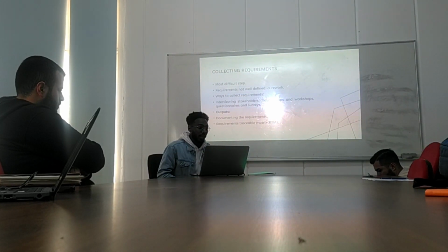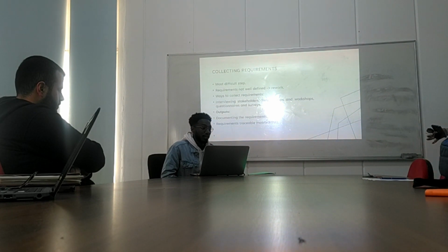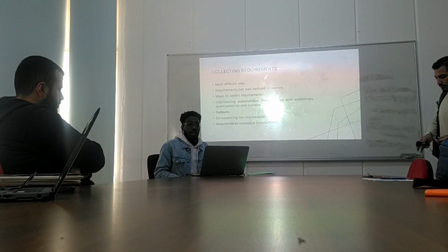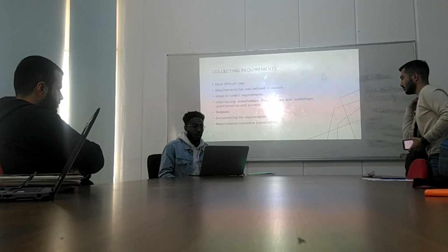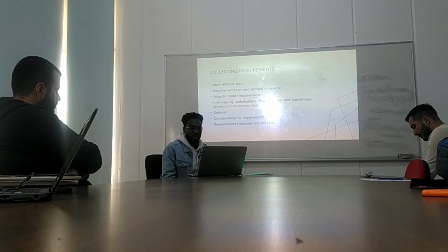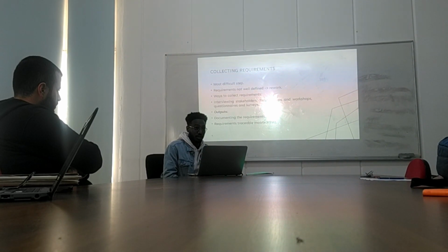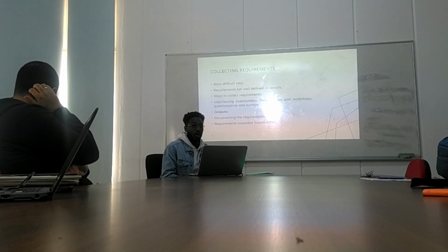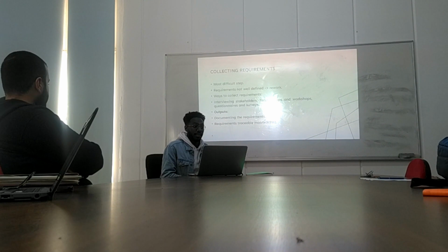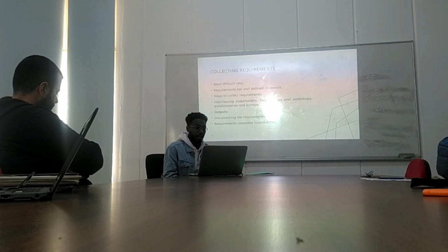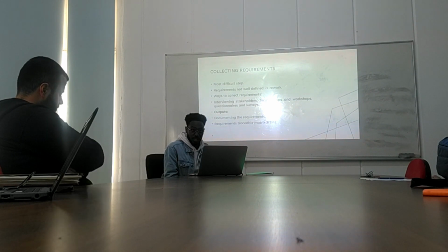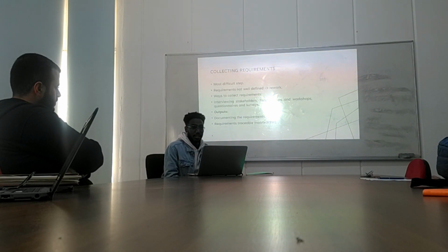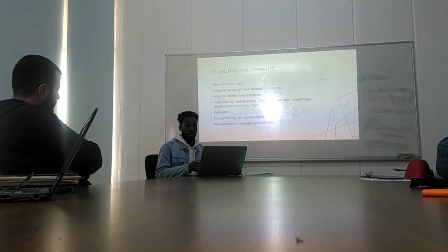And then here we have ways to collect the requirements. We have many ways. The most efficient one, mentioned in the book, is interviewing the stakeholders. We know that the stakeholders can be the sponsors of the project, or they can be the customers or users of the project. But this specific way of collecting requirements is expensive, the first thing, and the second thing, it's time consuming because you are going to interview each stakeholder by himself.